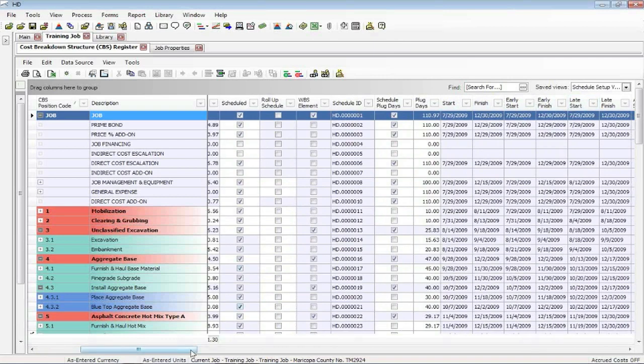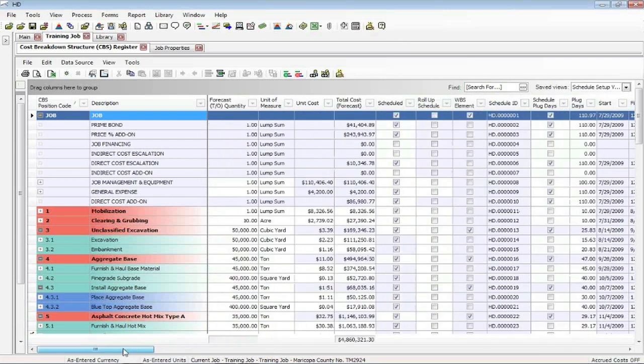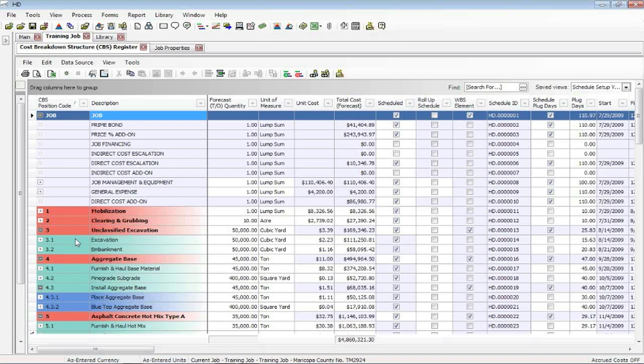Also, if you do change a duration to a cost item in the schedule, we will allow you to choose. Do you want that new duration to update hard dollar? If you say yes, we'll have new costs. It's no different than going into hard dollar and putting a different duration, so many days. Or you could say no. You don't have to send that same duration that you added in project back into hard dollar. You have the choice there to do that.